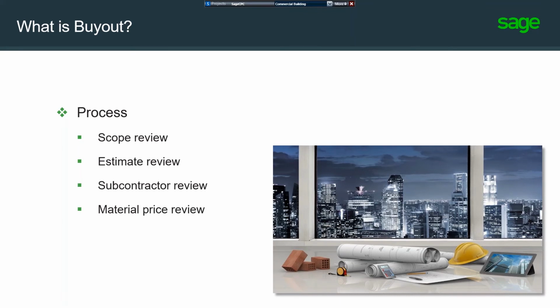We're looking for estimate review, an in-depth review of the estimate. Did we get all our I's dotted and T's crossed? And also subcontractor review. We might not only look for their pricing and coordination, but also their pre-qual information, like how's their liability and insurance coverage, workman's comp, licensing, bonding, maybe their financial stability, and maybe even their project management team that's going to be working on the project. So a lot of that can happen during the buyout process.